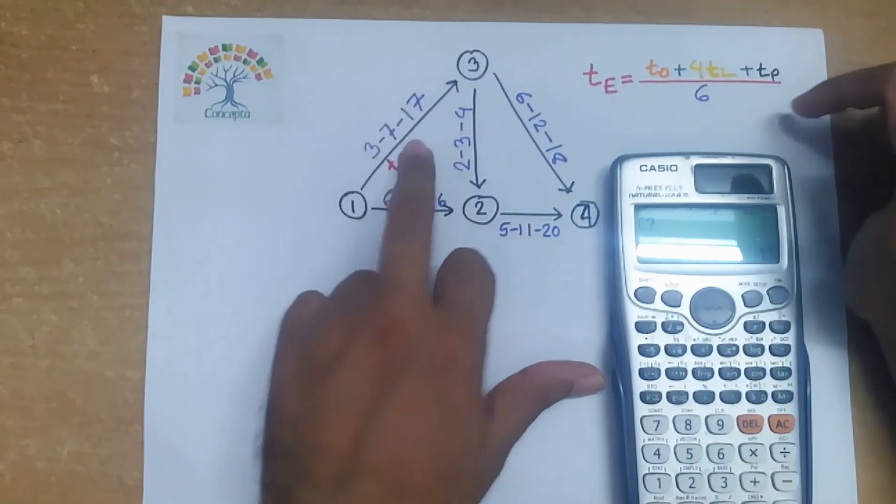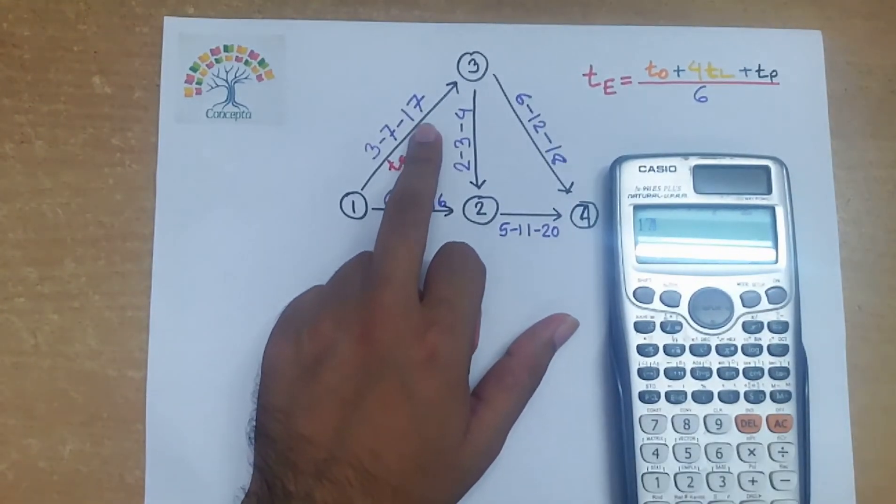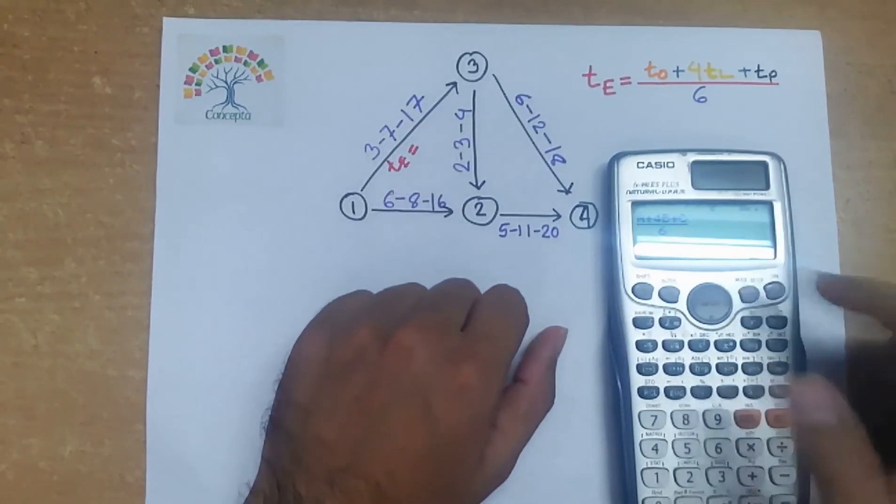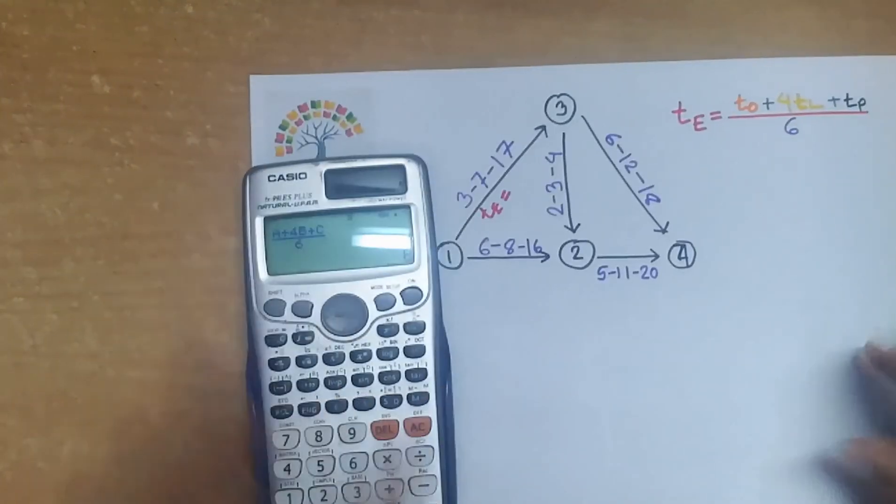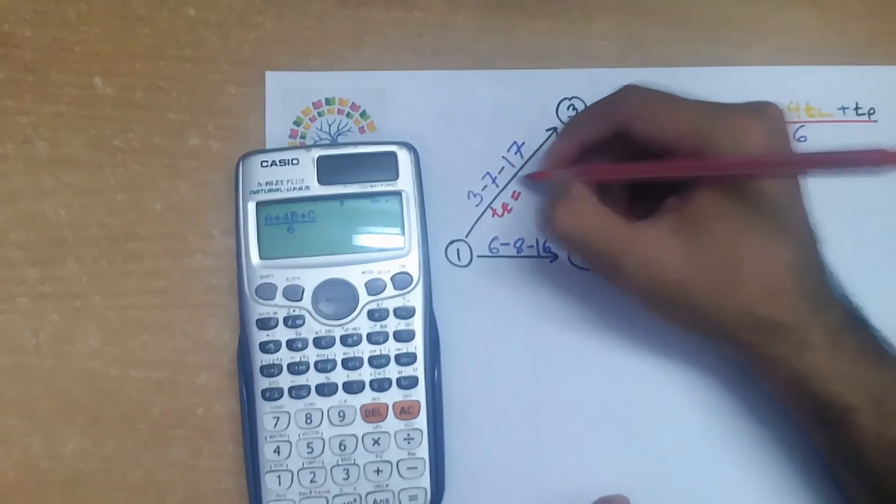press c instead of tp. That means c represents tp. So in the path, 17 represents pessimistic time, that is tp. So we will put 17. Then put equals. Then our te equals to 8. So we have found out the expected time te for path 1-3, which is 8.